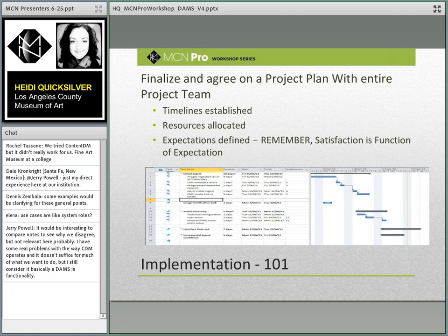really doing this. And then you can build that into your second iteration, maybe a third iteration, before you end up launching the system to your entire institution. Your first iteration is for working through bugs, documenting gaps and functions that you expected. Another reason that the iteration part works a bit better than the Big Bang Theory, in my opinion.